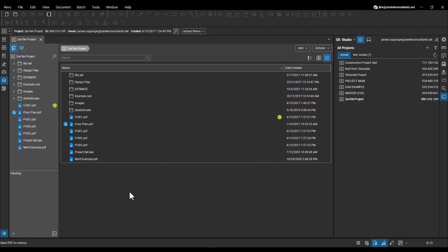Before you start bringing people into your job, you want to make sure that you've limited their control. You don't want to just say, okay, I'm going to invite these 300 people and then try and put restrictions and permissions on them after, when you can find out by the time you get there that they've already been in there and done damage in areas that you didn't want them in. So always set the permissions, the settings for people first.